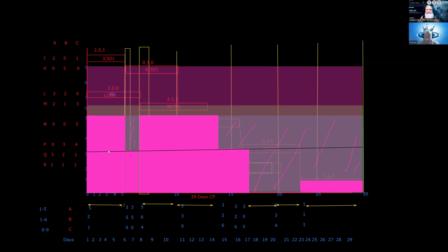Even if I require more, that means I am ready to expand these activities to a couple of days. Maybe it will be inflated. My whole schedule will be inflated from 29 to 31 days, right? But it will be more judicious use of resources.